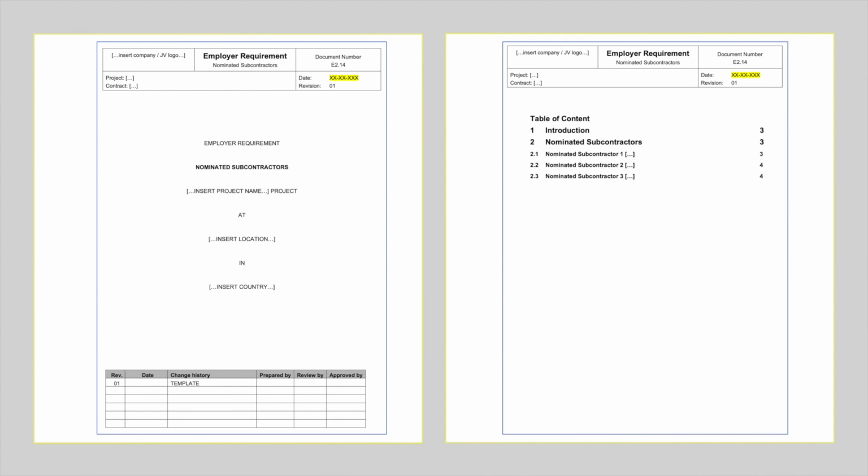Sometimes original equipment manufacturers are contracted early in the project development, and before or after EPC contract award the employer wants to nominate such supply contract to the EPC contractor. A good example is the main automation contractor.